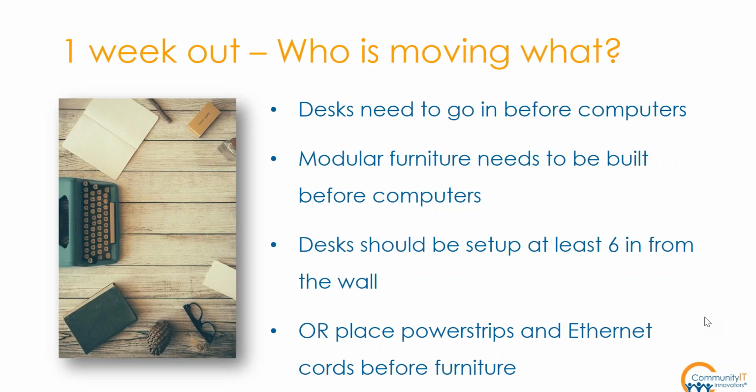And I think some other things to keep an eye on is the night before the move is when the servers go down. You want to make sure that everybody's off when you take them down. And again, make sure that you set up the servers or pack them away like the movers are expecting. You should know by now if they're moving your servers or not. And it'd be good to have some extra tools laying around just in case.